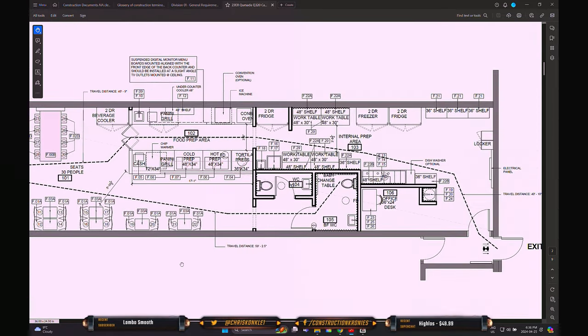And if you show up on site and it's like, oh man, I didn't put any exclusions in my price, the guy could come after you, right? So you need to say when you're pricing, I'm only pricing interior work, like partitions. I'm only pricing the partitions, ceilings, bulkheads, right? Or whatever else you're pricing. But I'm excluding the demising.